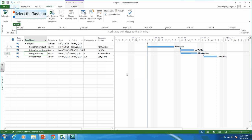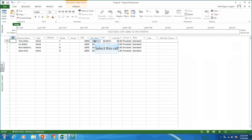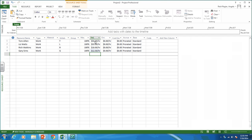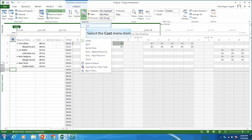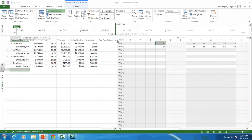Question two asks you to assign rates. Go to the task tab and the resource sheet, and enter some rates: Tom is $50 an hour, Liz is $55 an hour, Rich is $18, and Gary is $12.50 an hour. It also asks us to look at the resource usage view. Go to resource usage, then change the table to cost by going to View > Tables > Cost. Tom spent $2,400. That's the answer for question two.